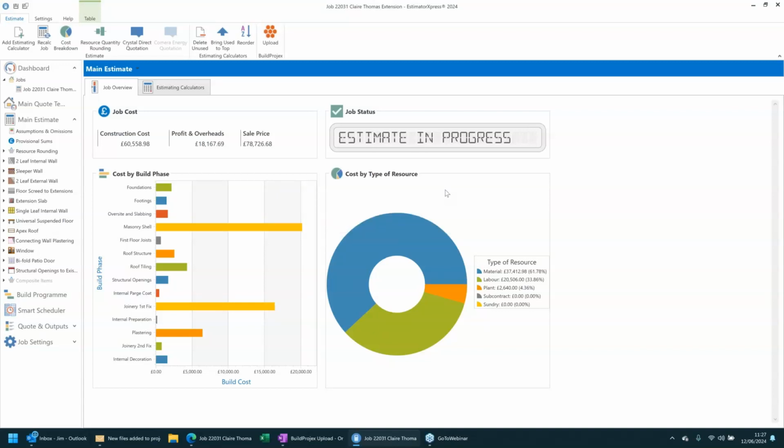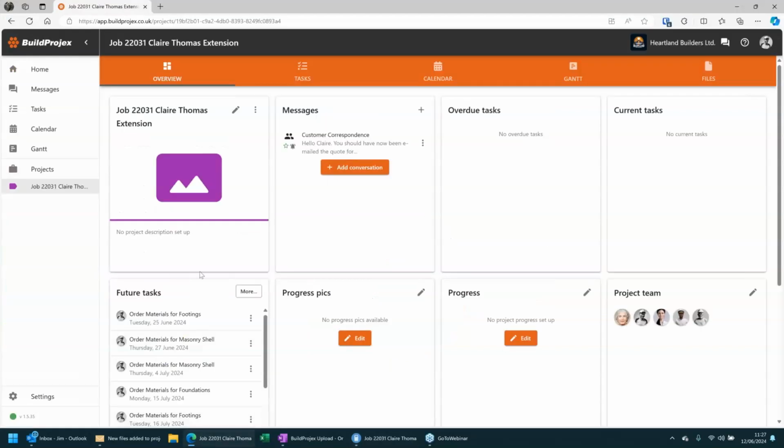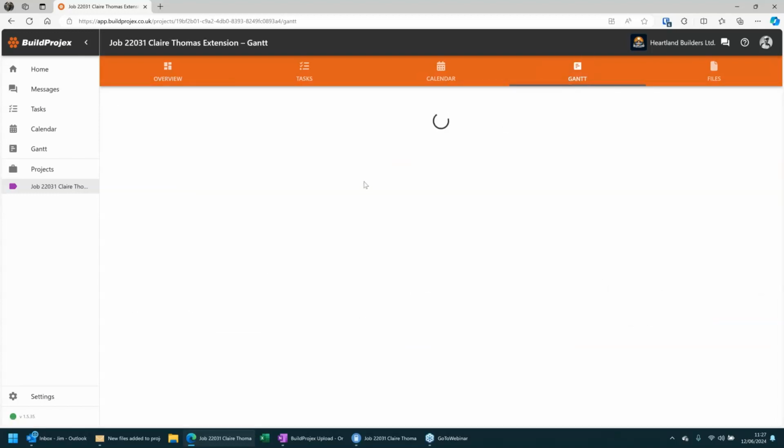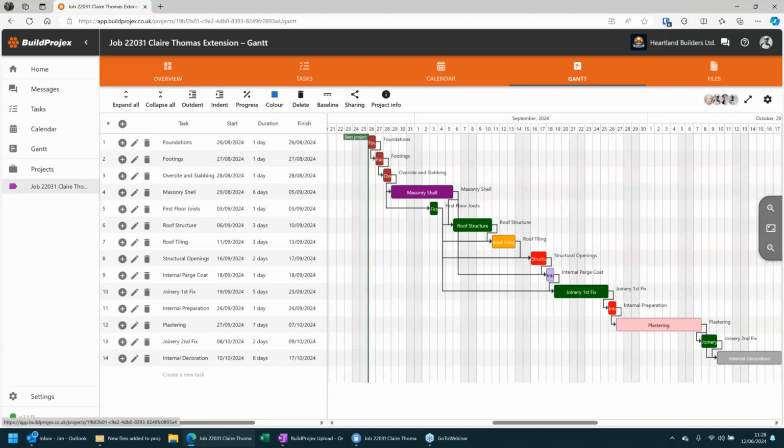Okay, so that's finished its uploading. So let's swap back to BuildProjex now. And you can see on this screen, we've now got a load of tasks appearing. The first task is the 25th of June. In a minute, I'll adjust the start date of my job, just to show you that they are all going to move around. So let's go to the Gantt chart, and we should see that the Gantt chart that I set up in EstimatorXpress has been uploaded.